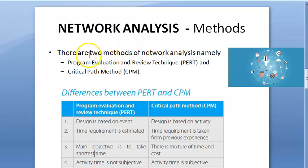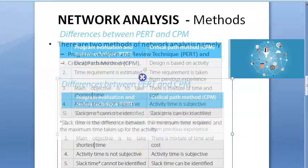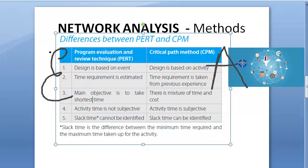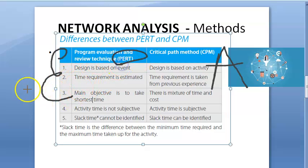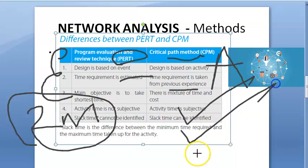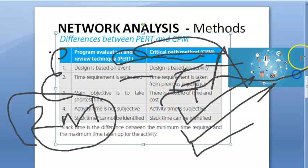There are two methods of network analysis: PERT and CPM. PERT is based on the event and Critical Path Method is based on the activity. In PERT, you don't know exactly how much time you need — you estimate the time. In CPM, from previous experience, you kind of know the amount of time that you need.